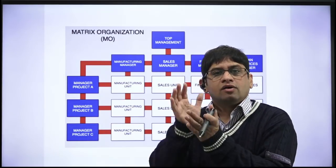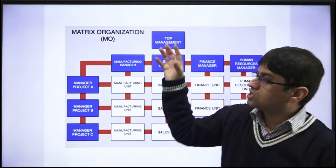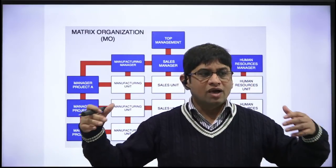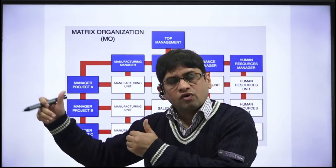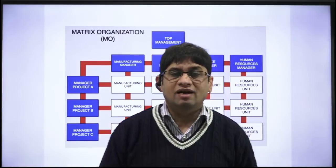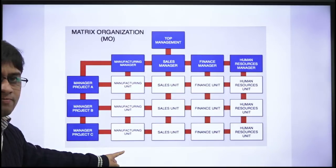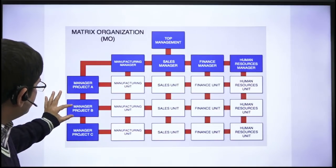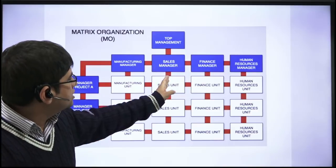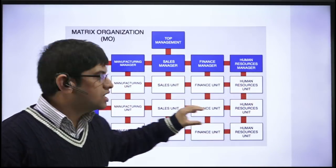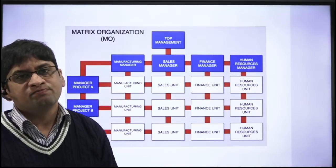We have already discussed concurrent engineering, which is always required to handle complex projects where multi-speciality domains are needed and people from different functional domains are required. In such situations, there is a requirement that different departments are connected and one project is handled by people from all departments. That particular requirement is met by the matrix organizational structure. In this structure, you can have different functionality teams across different projects, and one project can draw people from different functional domains.